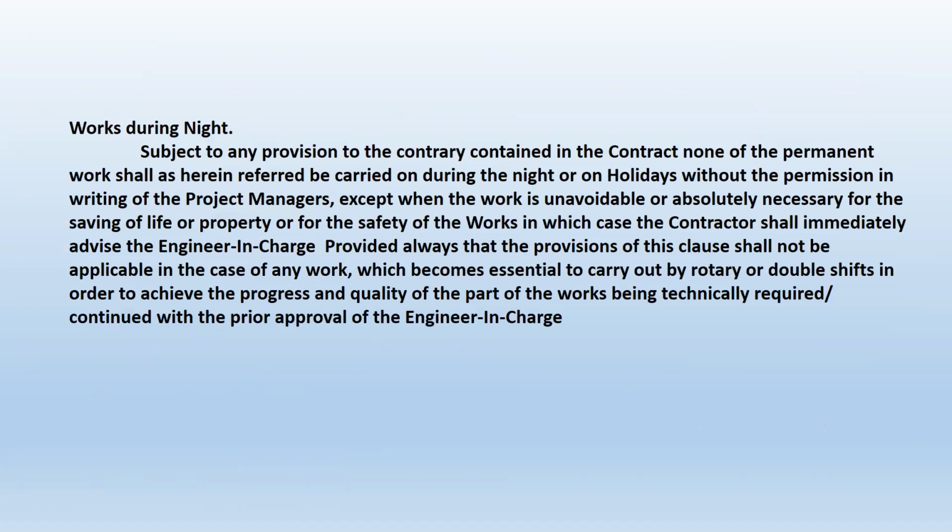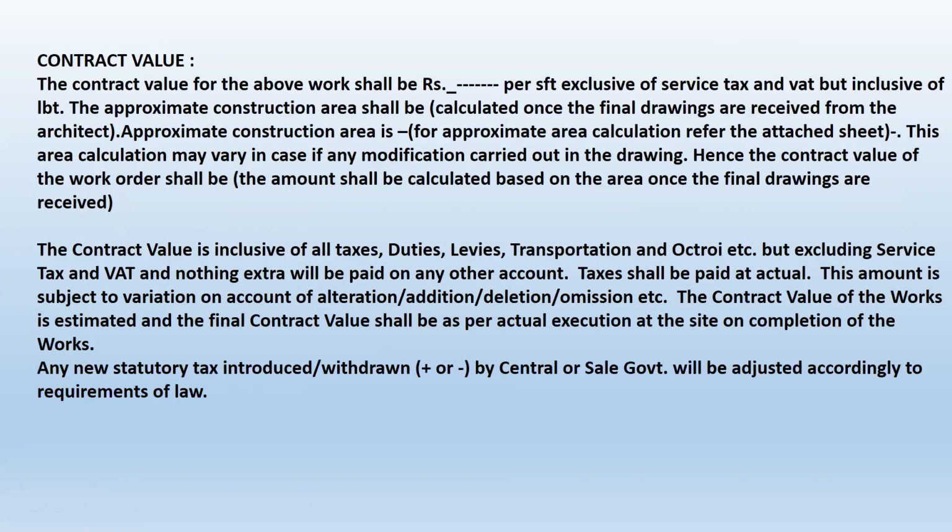Then comes night working. Night working generally causes a lot of concern to everybody because no one takes care of proper safety and everything. So you have to mention that whenever they want to do night work, they have to get an approval from the client, make necessary safety arrangements, proper illumination has to be incorporated in the project, and all these things have to be identified whenever works have to be carried out during the night.